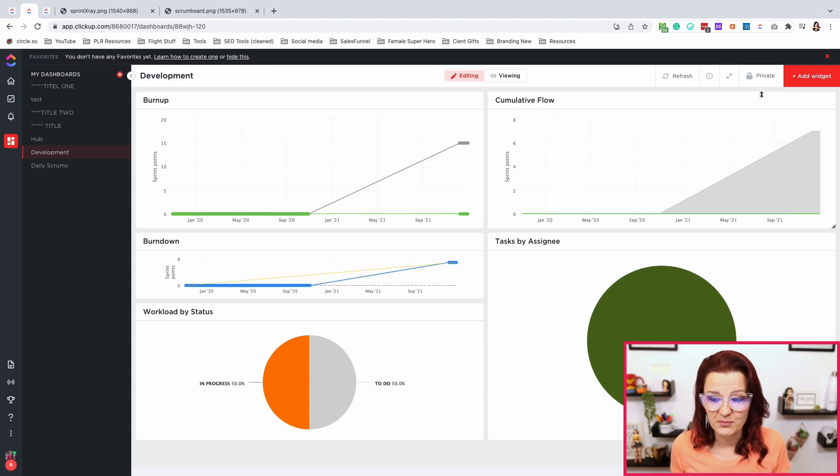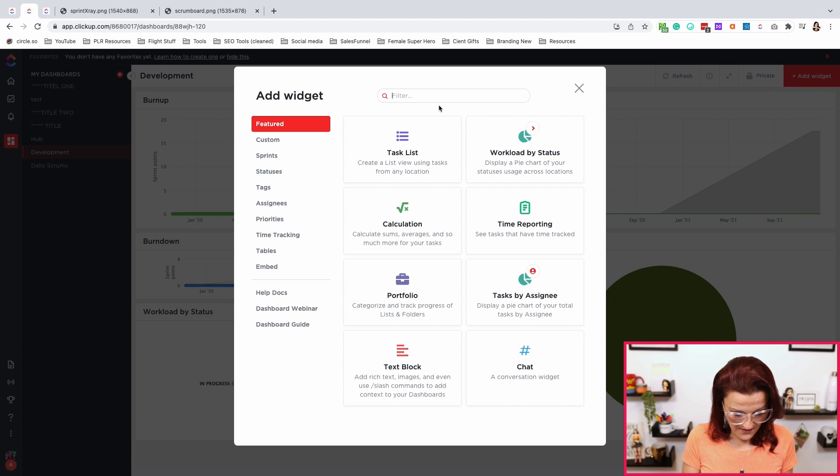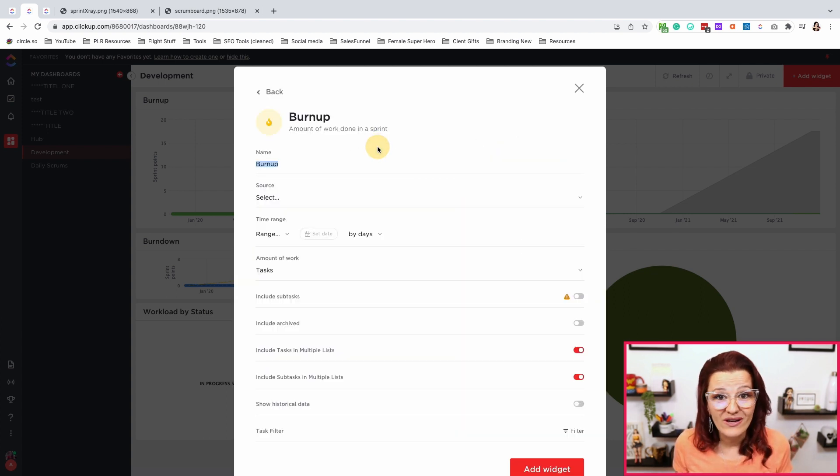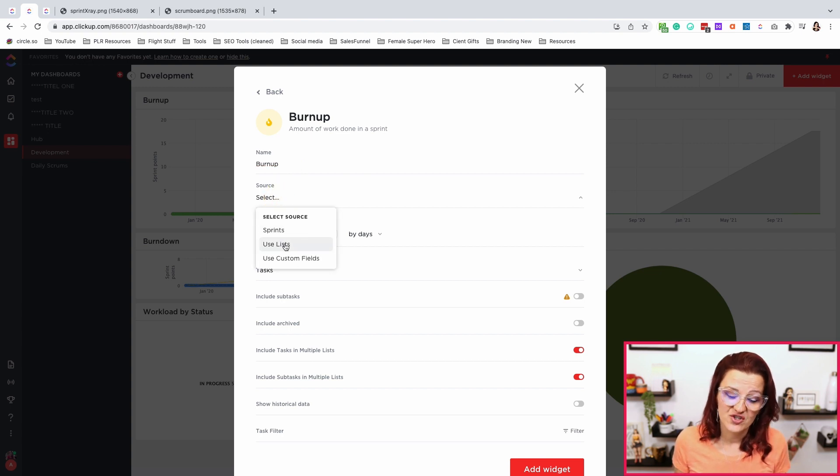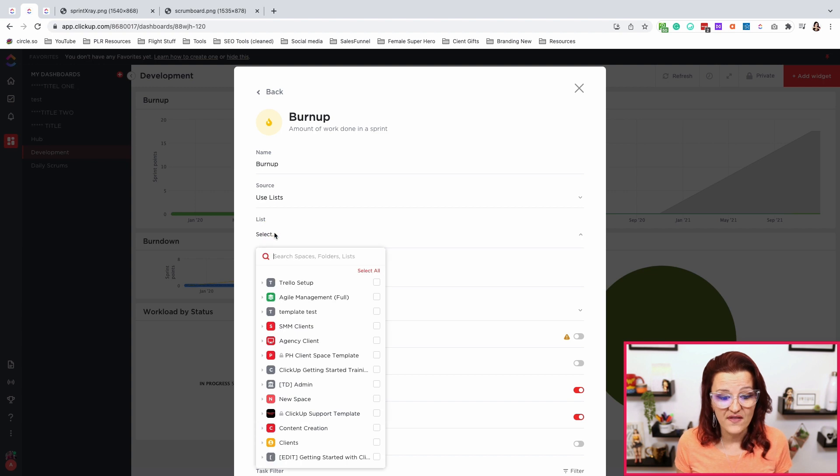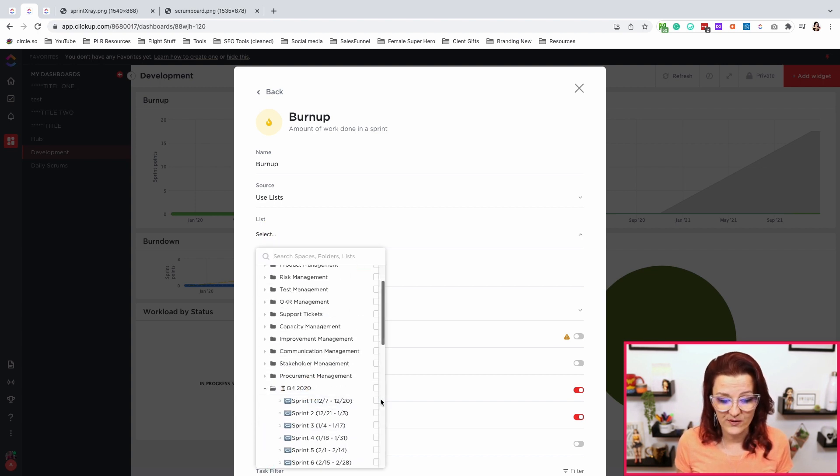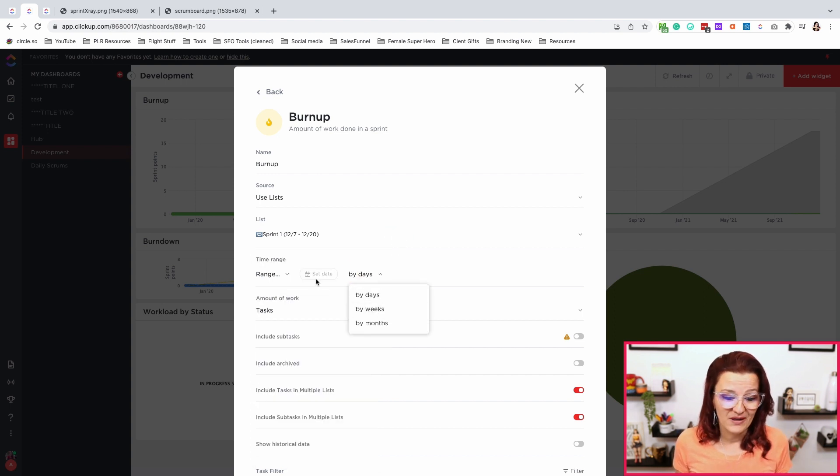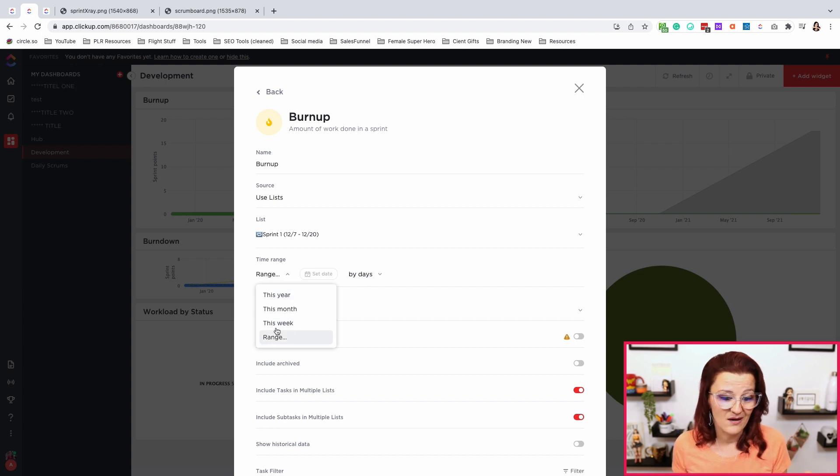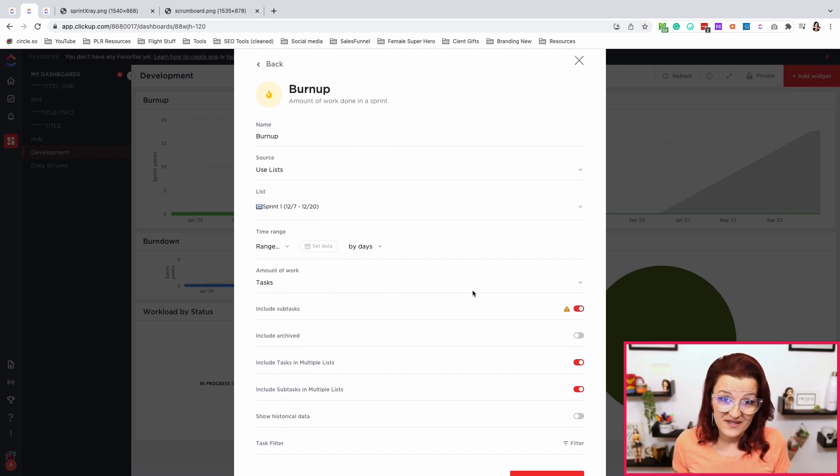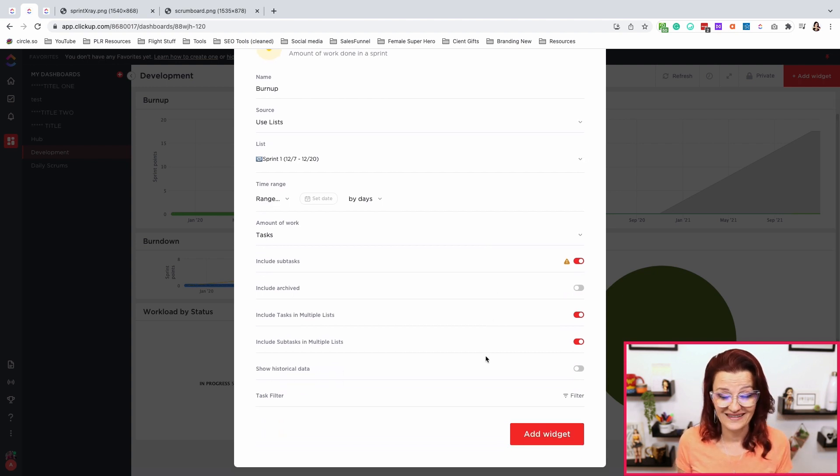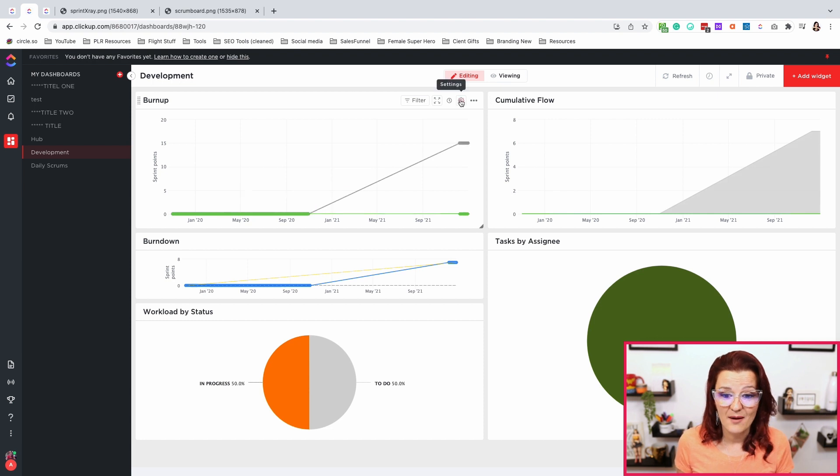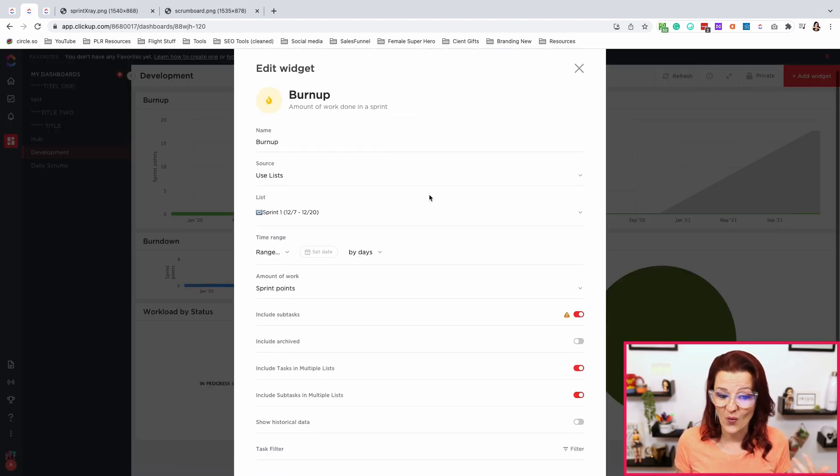So how do we set up this development dashboard? Again, it actually is quite simple because ClickUp has already done the work for us. Going into the widget area, you have your burn up and your burn down already ready to go. So name it. What is the source? Use your specific list of the sprint you are going to be working on. As you saw, we are using that specific sprint right there. Are we going by days, by week, by months? What time range are we using? Set it up how you need it, including your subtasks. Again, subtasks and multiple lists, we've talked about this. And there we go. That's how easy you can set up this burn up chart right in there.